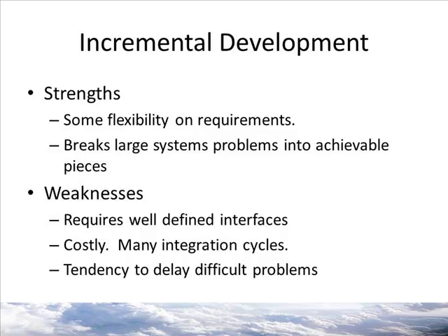It's also costly because instead of doing one giant project, you're doing maybe 6 or 7 iterations. So there's many integration cycles, and that's added cost to the final cost of the project. There's also a tendency to delay difficult problems. So if I'm doing incremental design, I might pick the easiest part and do that first because I want to get things underway, and then do my harder problems later, much like doing your homework. Same thing, you might do the easy homework first and then work on the harder things the day before it's due.